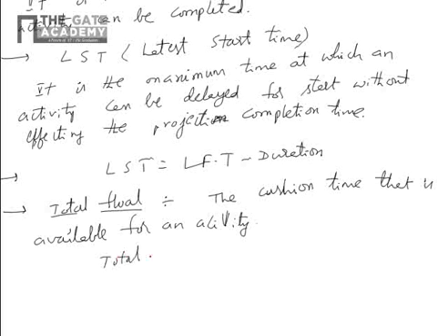Total float is equal to LST minus EST, or LFT minus EFT.